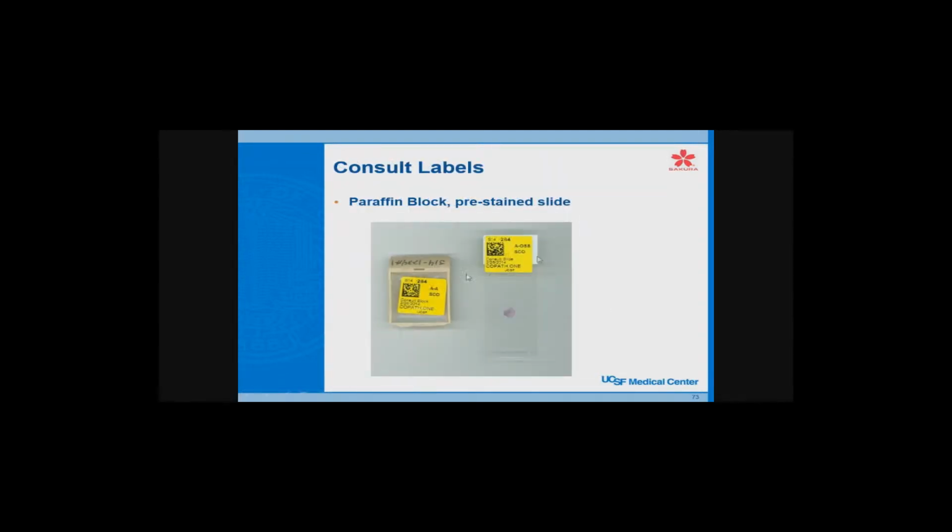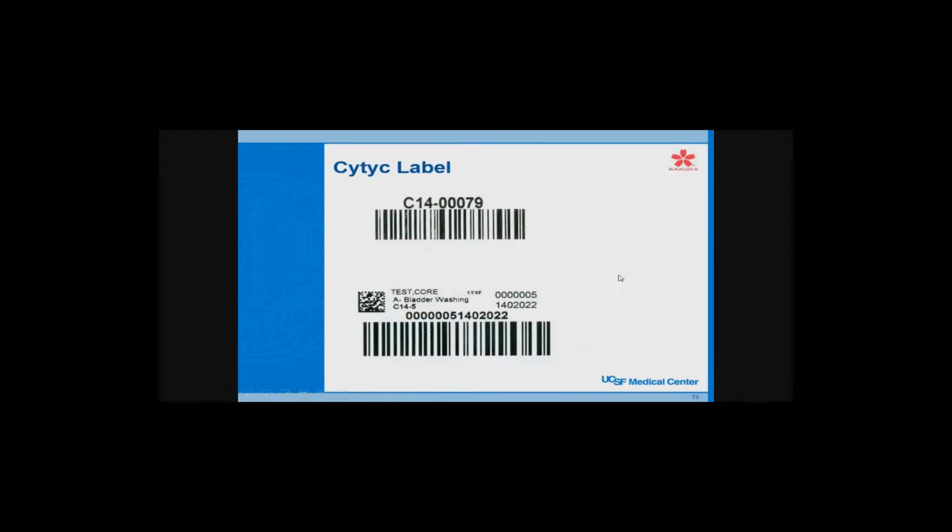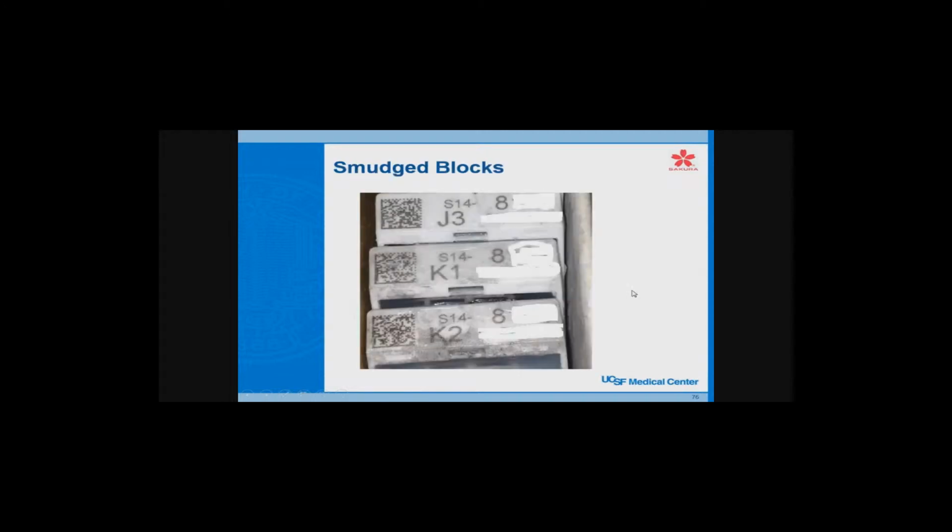So at the end of this, when you finally go live, nothing is perfect, so you're going to have some problems. The big thing is to start an issues log and perform the analysis. This is our issues log that we had set up. People just go up and write up any issue that they had with the system, and then we would, as soon as possible, try to resolve it.